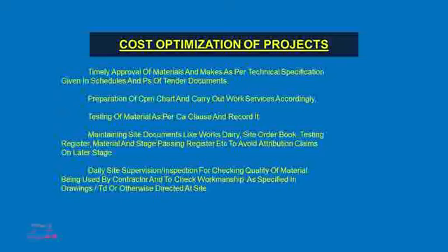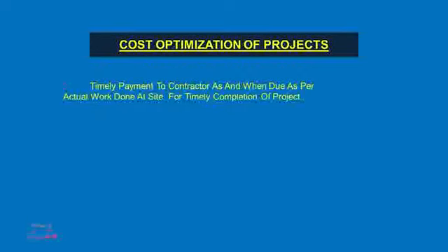Daily supervision, inspection for checking quality of material being used by contractor, to check the workmanship as specified in drawings, TD or otherwise directed at site. Timely payment to contractor as and when due as per actual work done at site for timely completion of the project.